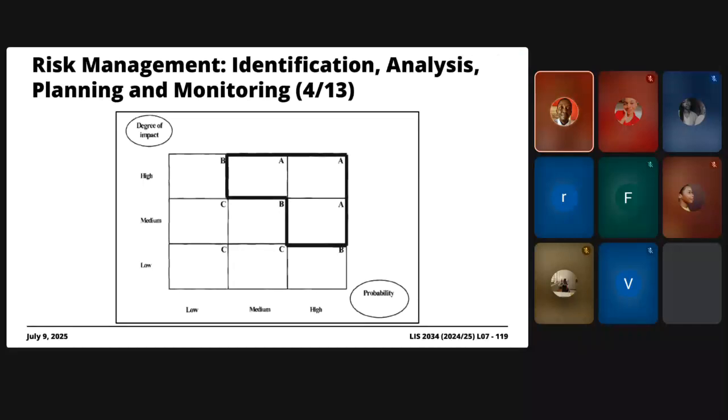All right. Just different visualizations showcasing exactly how you can prioritize these risks. If you notice in this particular diagram, on the x-axis we're showcasing the likelihood or probability scores, very low, medium, high, and then the y-axis is the impact on the project.